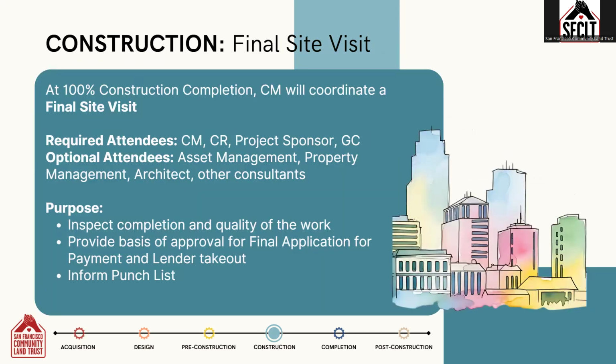When physical construction is 100% complete and the contractor has issued their final application for payment, the construction manager will coordinate a final site visit. The visit should be attended by the construction manager, the lender's construction representative, the project sponsor, and the general contractor.